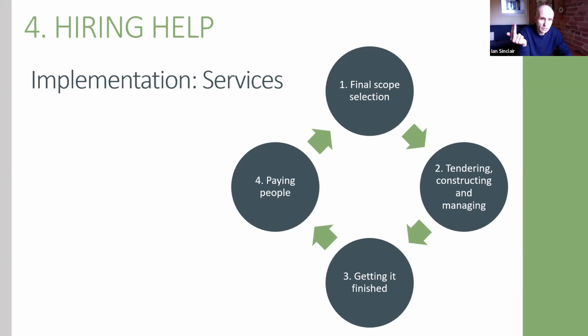It turns out the consultant went through for their lighting order but missed an entire floor because the door was locked. So you're going to need to be thinking about unit pricing, hours of operation, access, managing noise, getting it finished and paying people. Have you got the provisions in your management process to make sure that every single project gets finished?